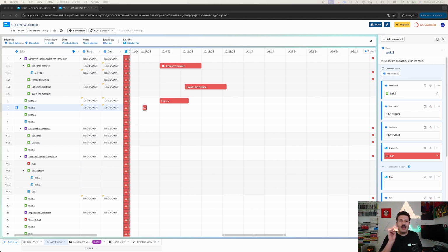And now let's talk about benefit number 2. Visor's a lot more customizable. Inside of your Gantt view down here, we can also change the start and end dates. So you can pick whether it's a due date or an end date, or maybe you have a different custom field in Jira. You can pick whatever dates you want to create the bars in the Gantt chart itself. You can also alter which level in the hierarchy you're going to see. So if you want to see an entire hierarchy or just a piece of it, you have the ability to change that here. And there's a zoom, right?